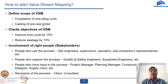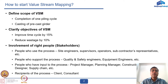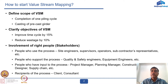Once the scope is defined, the next important point is to clarify the objective of value stream mapping — why we are doing it for that particular activity. For example, it could be to improve the time cycle by 15%, or to reduce wastage by 10%. When we do the value stream mapping, we need to focus on that objective.